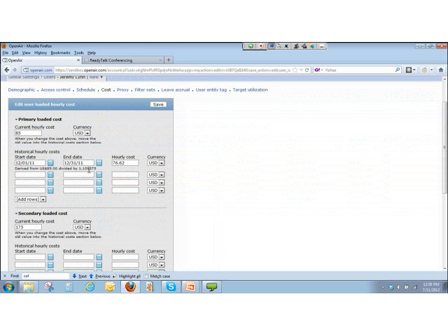So when I run a profitability on a project, I will get true profitability for the company. By using more than one of these costs, you can actually tell the system this primary cost may be my cost, salary, adjusted, all that kind of stuff. And my second level cost could be my banded cost. Everyone gets 175 at this as a project manager, and I'm not going to change that. Every hour's worth that. Obviously, the profitability reports will be very different from that perspective.